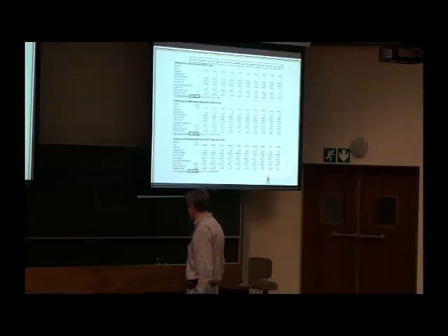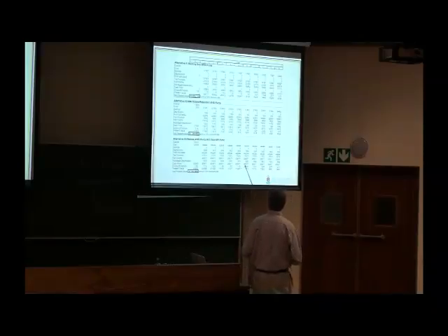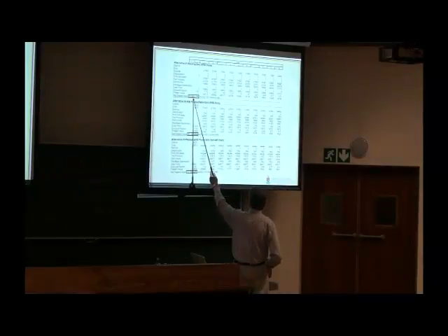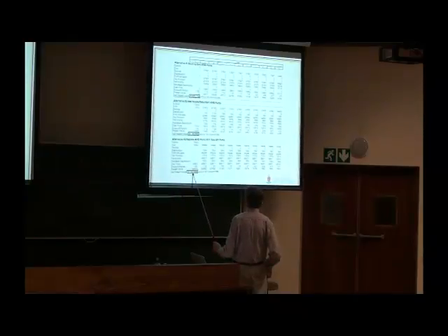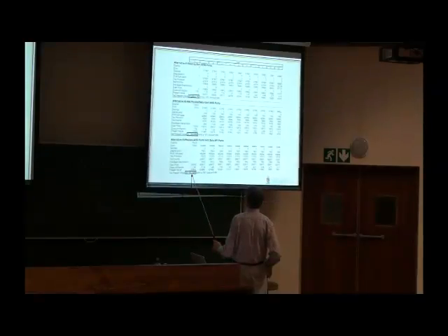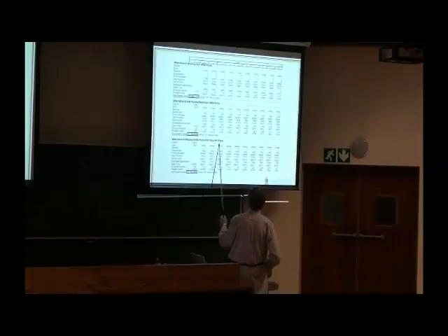There you have the three alternatives, and the information on those tables has now been taken into this, and now you can see that you have various net present values for the various models. There's the one for the existing solo ANC, minus $203,000, minus $89,000, minus $183,000. So that is the parallel redundant. This one is replace the ANC pump with a solo API pump.